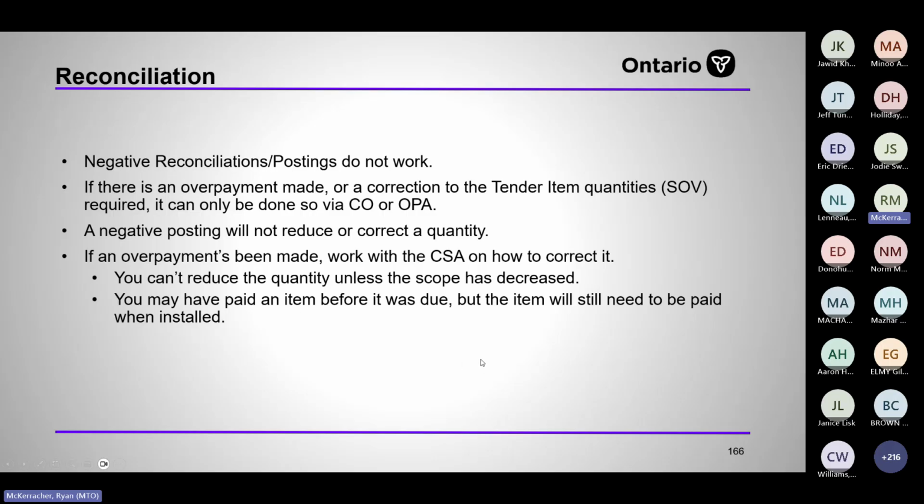There's the inspector making the pay statement, the CA reviewing it, the CA reviewing the reconciliation, then the contractor drawing the invoice, the contractor submitting it, then the invoice going through CA review, CSA review, CST review, and head of contract services review. So 4 levels of review. So hopefully it gets caught before then, but mistakes do happen.